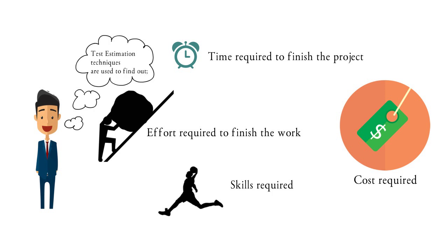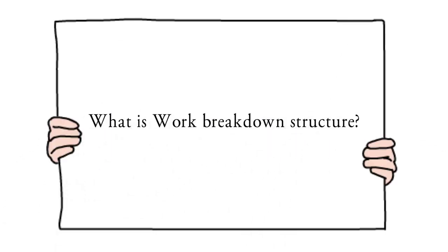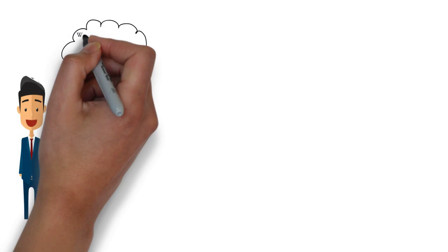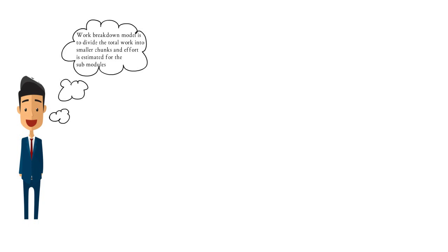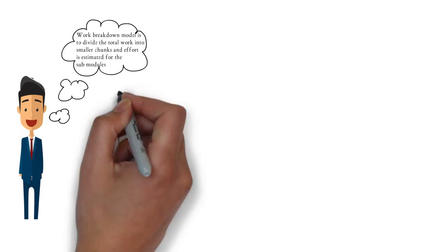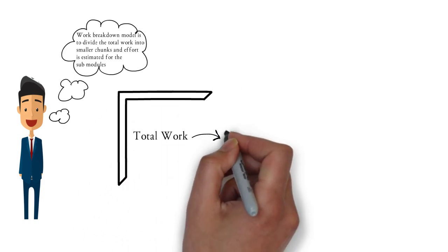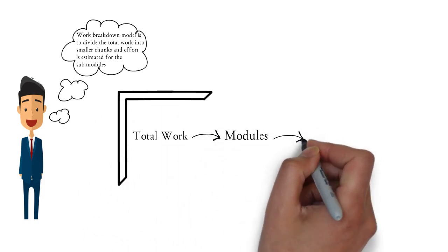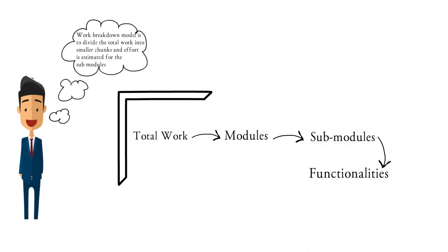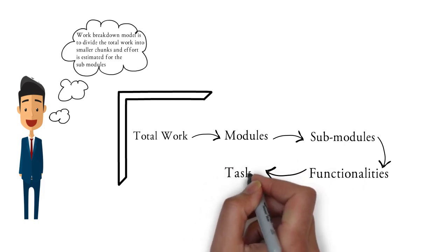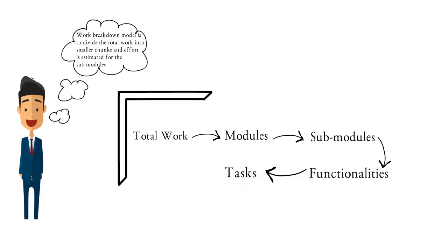Test estimation is one of the activities which we perform during the beginning of the project. Now let's understand what is work breakdown structure. Lots of effort and work is required to complete the project. In work breakdown structure, the whole work is divided into smaller chunks and effort is estimated for each task. The total work can be divided into different modules, each module into sub-modules, and each sub-module into different functionalities.